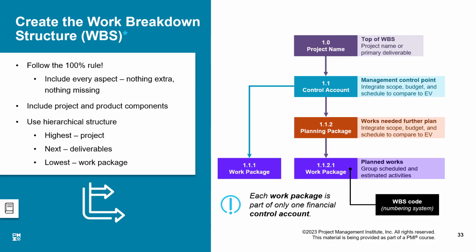Like, you are constructing a house. Construction of a wall could be the work package. But when I say smallest unit of work, that does not mean that it cannot be further broken down. The work packages can further be broken down into activities. The work package is a level of interest on which the project manager would like to get the report.